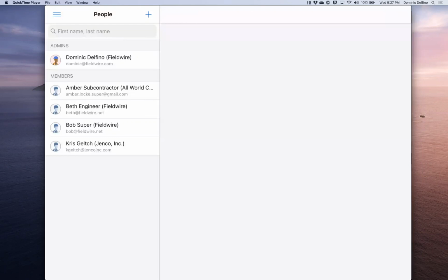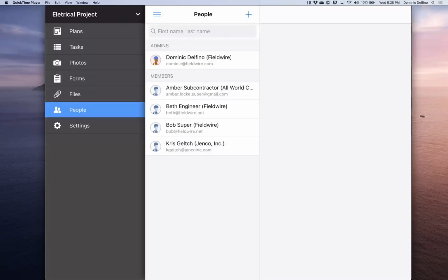So if you assign it to the wrong person and nobody else is aware of it, and it's been 2 days and nobody's said anything, you might need to revisit who you assigned that to, and then make sure you add those watchers. A good for instance would be if you asked Ken for some assistance with something and you wanted the project manager to be aware of it, you would have to add that PM as the watcher so that they also get the notification, right?